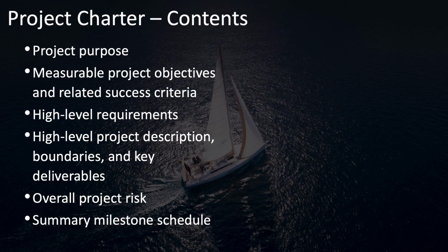The project charter also includes the high-level requirements of the project. These will have come from key stakeholders who you have worked with or others have worked with to create the needs assessment and business case from which you can draw some of these high-level requirements. You'll also have a high-level project description, including its boundaries and key deliverables. Some of this should already be known, but if not, developing this will be part of the develop project charter process.